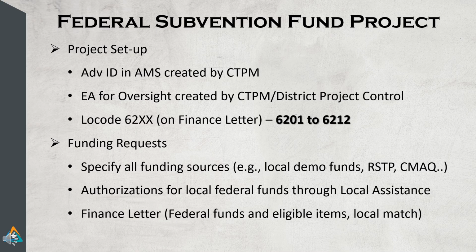Now is a good time to look at the programming document, because oftentimes you'll have federal funds, state funds, measure money. It could be a combination of funds, so make sure you understand that and share that information with your district local assistants. Once they authorize the funds, they will issue a document called the finance letter. This is a good document to keep a copy of. You should have that in your project files because that tells you what was programmed in.